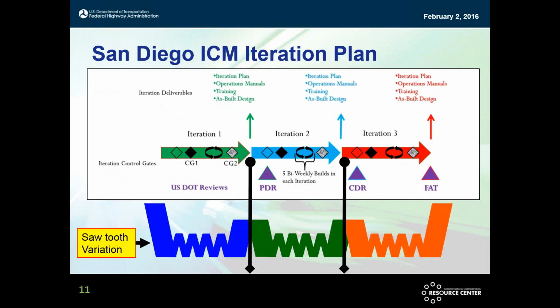Now down here, that is the V. Yes, you can check yourself with the V process here, literally. We have well-defined each of the micro iterations at 2 weeks. Iteration 1, post iteration 2, and notice how it goes. Iteration 3, acceptance test at the very end.